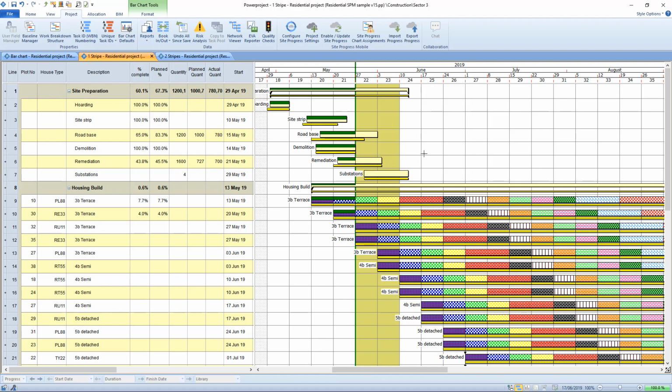And if something's fully outside that stripe, like this activity, it won't be included in the list of things to look at to say whether they've been progressed. So if any part of a task touches that stripe, it will be in the list to progress. So we don't want to export everything. We want to give you a focused list of what's likely to be updated.